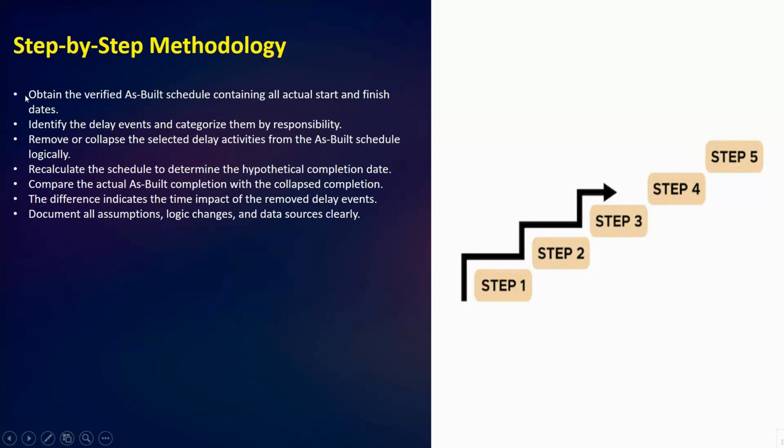Second, you can see, identify the delay events and categorize them by responsibility. We will list all the delay events that occurred during the project and classify them based on responsibility, whether caused by the employer, the contractor, or excusable factors such as weather or unforeseen conditions.